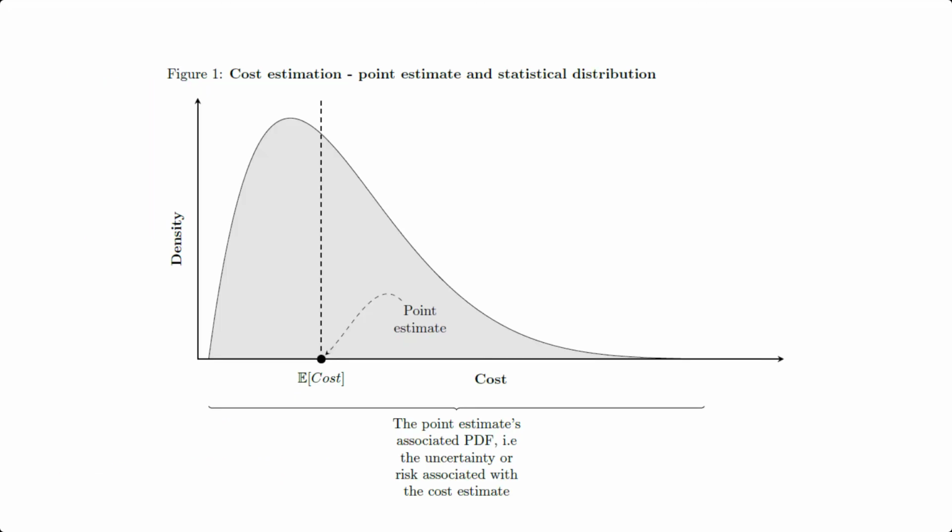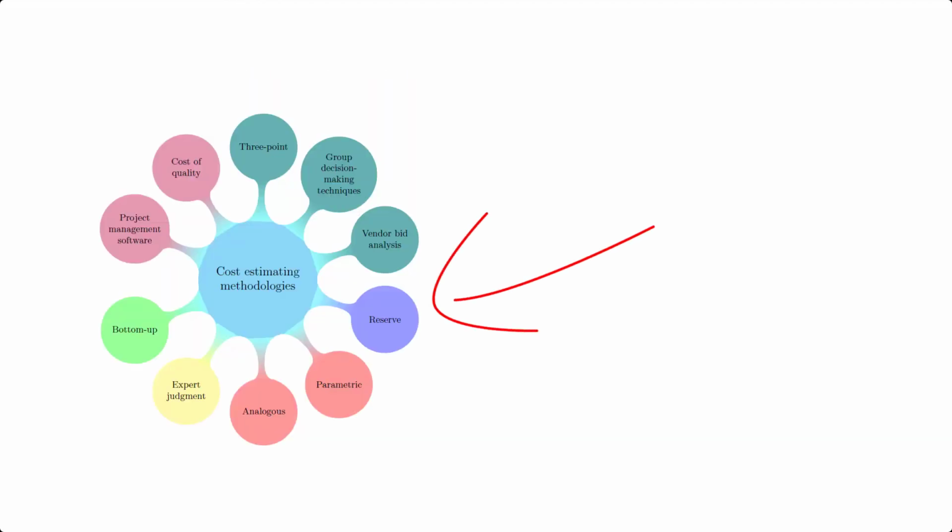One final thing to say here is that a point estimate, which in our case is 150 kroner, is seldom sufficient in order to do decision making. We also want to know the inherent uncertainty of that point estimate. In other words, we want to find a probability density function surrounding the number. And to do that, we can use Monte Carlo simulation. Based on the Monte Carlo simulation, we will get a histogram, and based on that, I want to find the standard deviation and add that back into the point estimate so we can do a reserve analysis in addition.